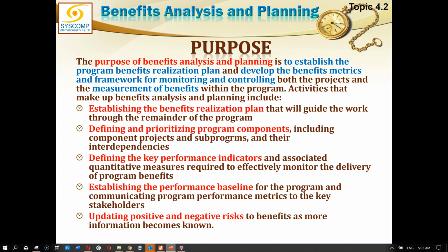And where this guiding structure gets its own guidance from is the governance plan. So the program governance is providing the input on how the benefits should be realized, and the benefit management plan is defining the plan about the plan. The benefit management plan does not actually include the benefits. It includes how to identify the benefits, how to deal with the benefits, how to transition the benefits, how to sustain the benefits, procedures only, and the details are in the artifacts.